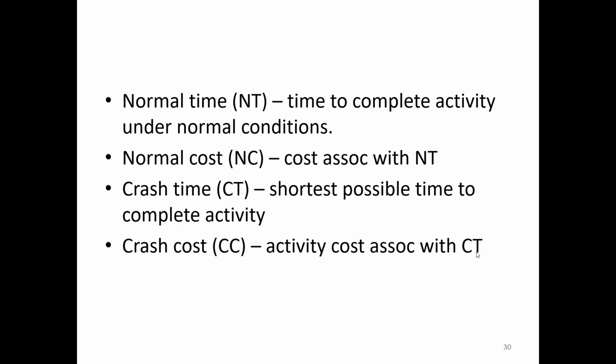Doesn't mean that that's how long we want to take to complete an activity, but it's the shortest possible time it takes for us to complete an activity. If we're excavating, there comes a point where no matter how many backhoes and equipment you employ, it just takes a certain amount of time to complete that activity.